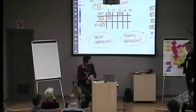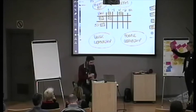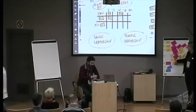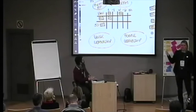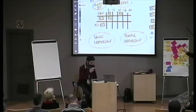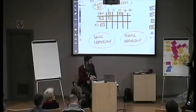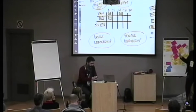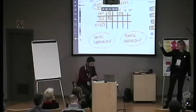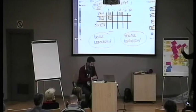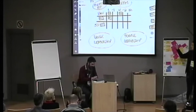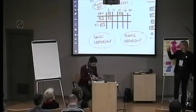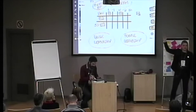Let's talk about what happens with the real daily planning and when we move waiting items from the sprint board back to the planning board. A lot of times when things happen — like a customer request, or our Bob example — we decide in this sprint we have to call Bob on Monday. How long do we wait? If we wait a day, we would move the OBI to Tuesday, on its side, and if Bob didn't answer by Tuesday we will take action. It could be that you give Bob a week — because you know he's at a conference in Spain this week. That means you take your OBI from this Monday and put it in waiting for the next sprint.